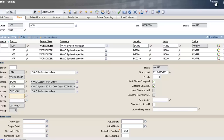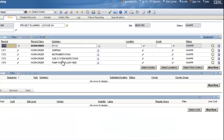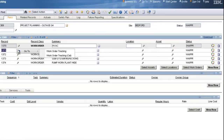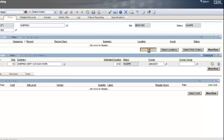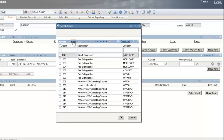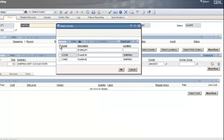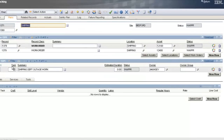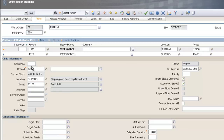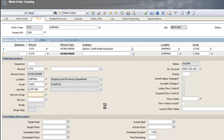Now I'll return to the project and change hats to become the shipping department. Click the arrow next to work order 1371, go to Work Order Tracking, and on the Plans tab click Select Assets. Filter for the shipping department assets — I just have two forklifts that need work. Selecting them automatically creates two additional child work orders attached to the shipping department work order. I'll open the detail, add a job plan to each one, and save the record.